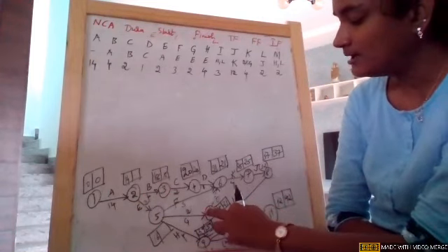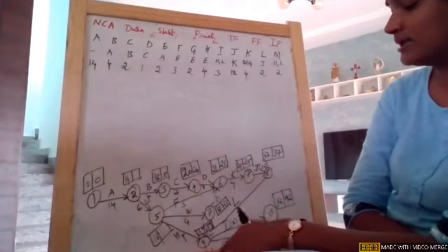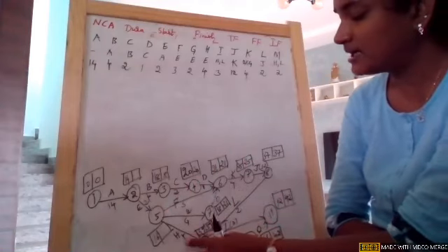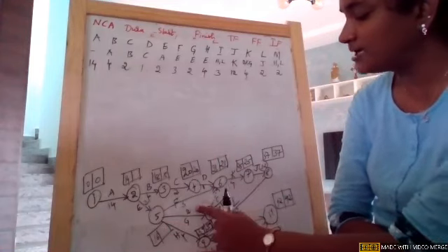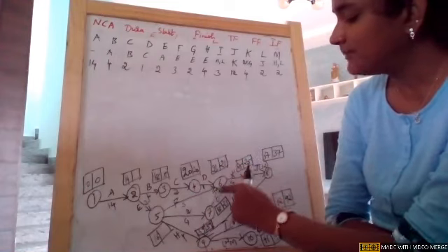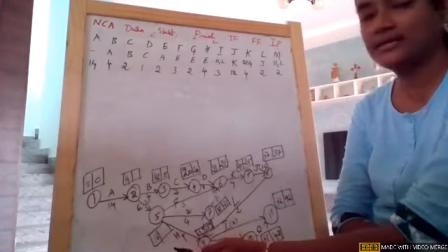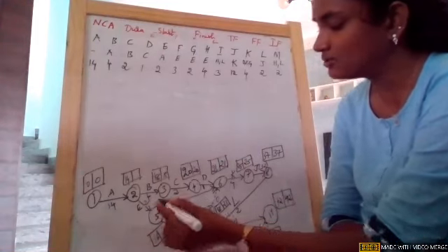From node 7, if I go to node 5, there are 3 tails. See the 3 durations, what are we getting? One duration 39 minus 4, it is 35. The other duration 29 minus 2, it is 19. The other duration 21 minus 3, it is 18, I think so. So the smallest one is 18. So I'm writing 18 near node 5.